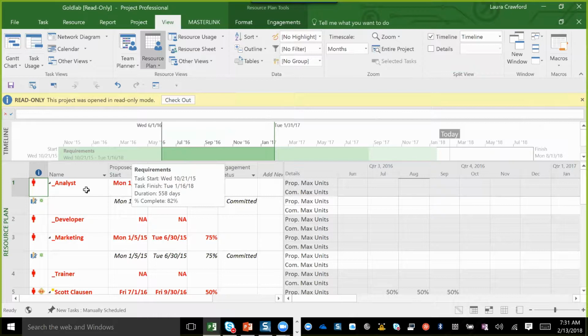But what I want to point out is that when you're in those early planning stages of a project, you don't necessarily know what all the tasks are in the project plan or who's going to be doing the work, and you might not know the estimate for the work that's involved. Engagements give you the ability to forecast at the project level the skill set that you need or the named people that you need, the duration that you're going to be using them.